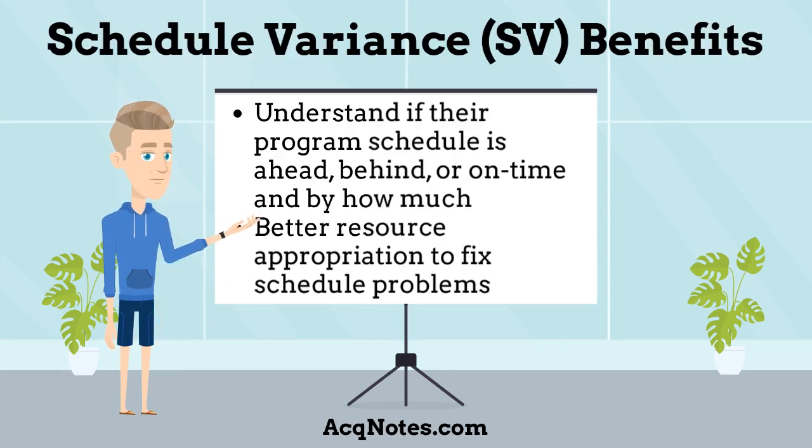What are the benefits of schedule variance? The key takeaway from schedule variance for a project manager is that they can understand if their program schedule is ahead, behind, or on time and by how much. An example would be they can communicate that they are 10% ahead of schedule. This gives them a data point that allows them to better appropriate resources to fix schedule problems.